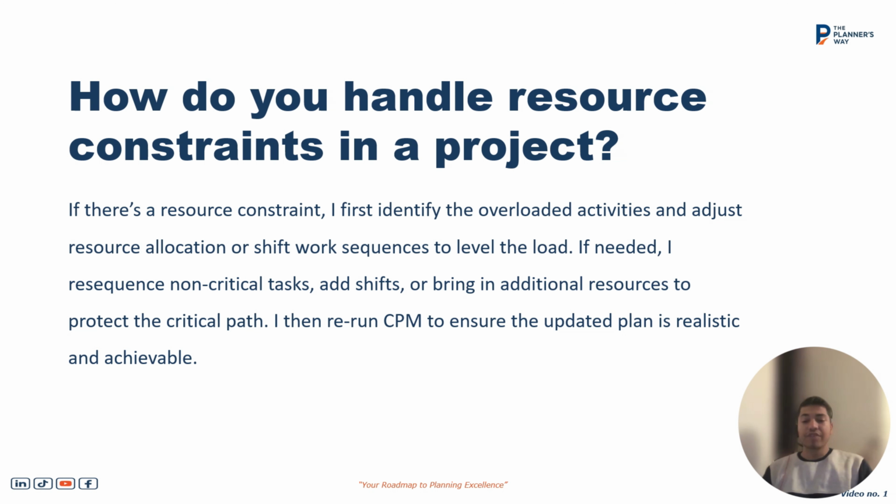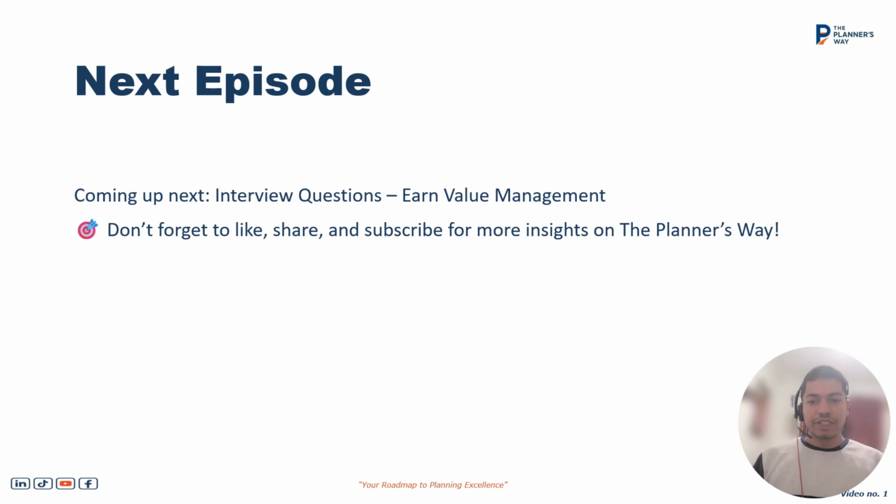And if there is any impact on the critical path due to the resource constraint, what I mean by impact is if the project completion date has been moved forward, or the float has been consumed, in that case we need to raise the change control form and take a mitigation approach for that resource and minimize its impact. The next video in this series will be on value management.